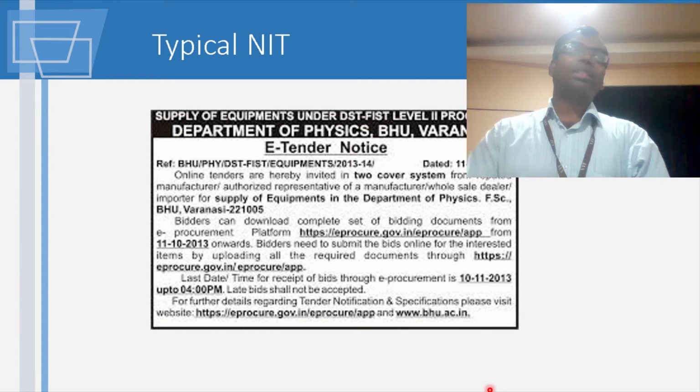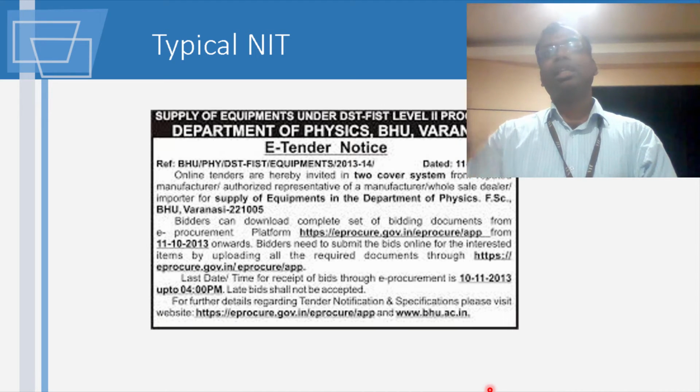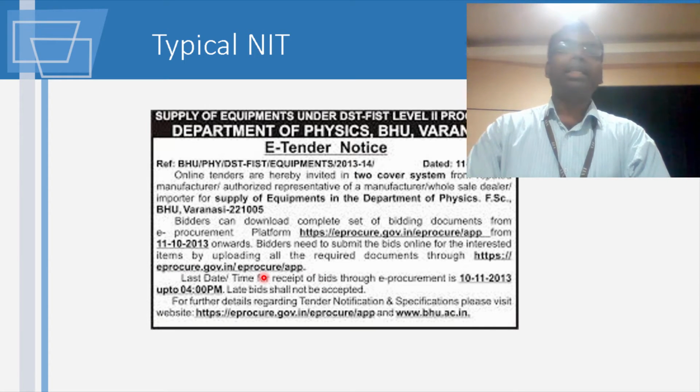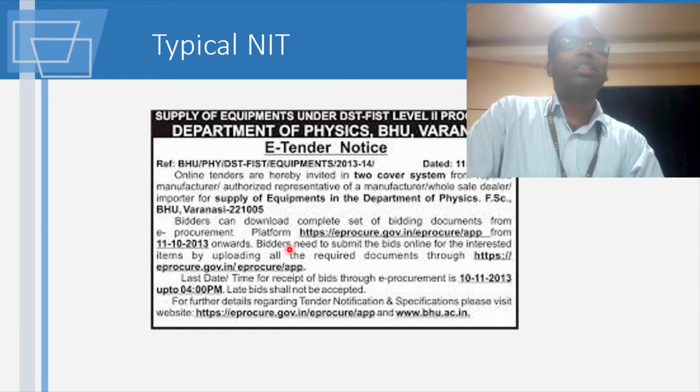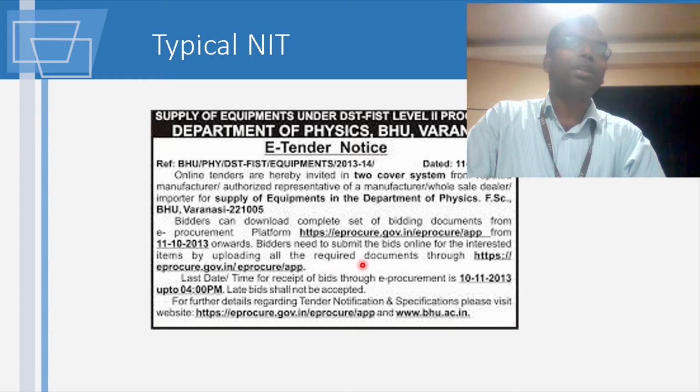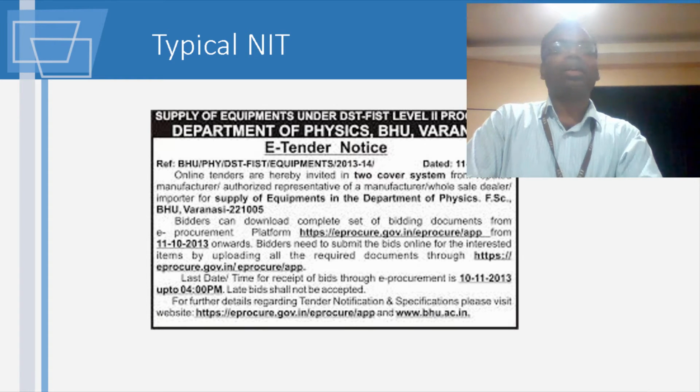The triple CL went for a loss and still took the airport project because they wanted to pre-qualify for bigger jobs. Okay, so then there is always the last date. Earlier people used to escape citing postage delays. Now it is all to the last minute. Okay, I know how people in the tender department work. If the government says it's 12 o'clock midnight, you have to submit it by 12 o'clock in all respects. Otherwise it will just be locked.